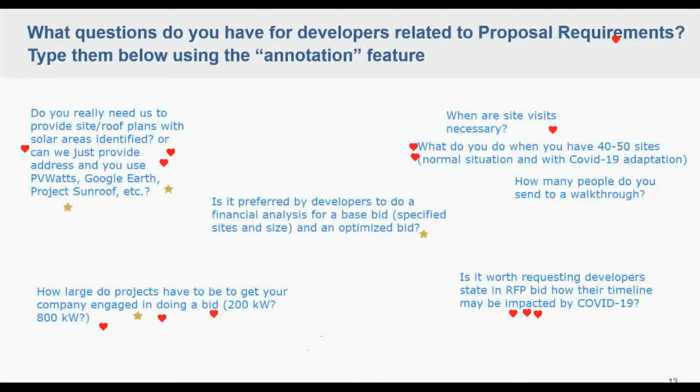I'd say the exception is if there's a project where we know there's going to be specific issues or concerns that could lead to a site visit coming up with a very different proposal than a pre-bid site visit. In that case, we'd probably recommend doing it like a short list: invite 2 to 3 of the shortlisted parties to come do a site visit and then provide a best and final. I do think there are tons of ways to get around site visits in the RFP process.